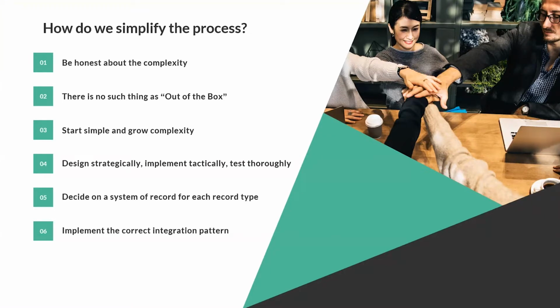There are so many times too that we've seen a lot of integrations, either where we come in to help with a rescue project or maybe we're coming in to talk to a customer and there's a system that's just been way over architected. And so many times we end up reversing a lot of that and just making it more simple. Maybe it is a nightly batch rather than trying to do things real time. Or maybe it is just a handful of fields instead of turning on the full out of the box.